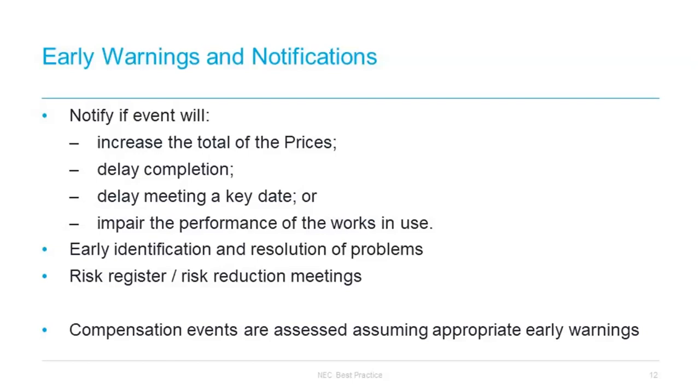The idea is that regardless of whose risks they are, they consider what they might be and put some prices against them so that everyone has a more realistic approach to how the project is going to turn out. You do not add on a sum for every risk that you're going to come across, but should take a weighted approach to it. Now, you can build that sum in, but on target costs, it is easier to do that where no one would win or lose by that.